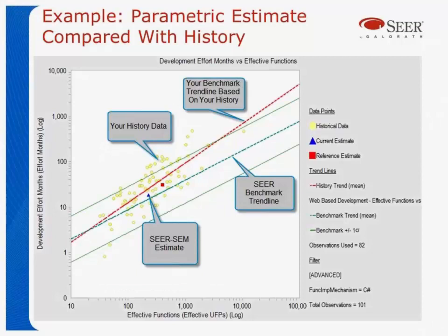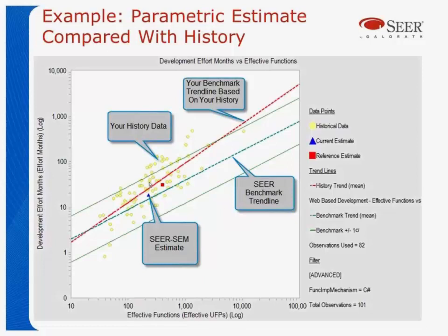Here's an example from our SEER model plotting an estimate versus reference classes. You can see the estimate from SEER SEM and another re-estimate — basically the range of SEER estimates. Here are historical data points with trend lines. The likely estimate is probably somewhere close to the middle, but it looks like it might be a little optimistic. That doesn't mean SEER did a bad job, but it does mean the input parameters ought to be looked at again to verify they're viable.